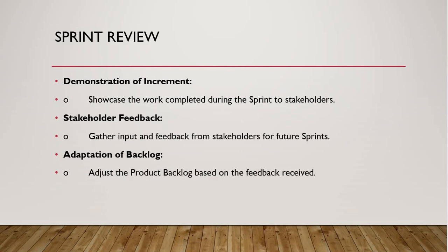Okay. Sprint review, demonstration of increment. Okay, showcase the work completed during the sprint to stakeholders. So sprint review emphasizes the demonstration of increment. We are going to show the stakeholders what has been completed in that sprint, and then we are going to get the stakeholder feedback.